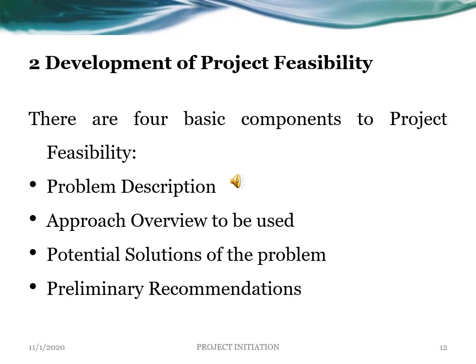The development of what we call project feasibility. There are in fact four basic components to project feasibility. First one is problem description. Second one is the approach overview to be used. Third one, potential solutions to problems. And the fourth one is preliminary recommendations.